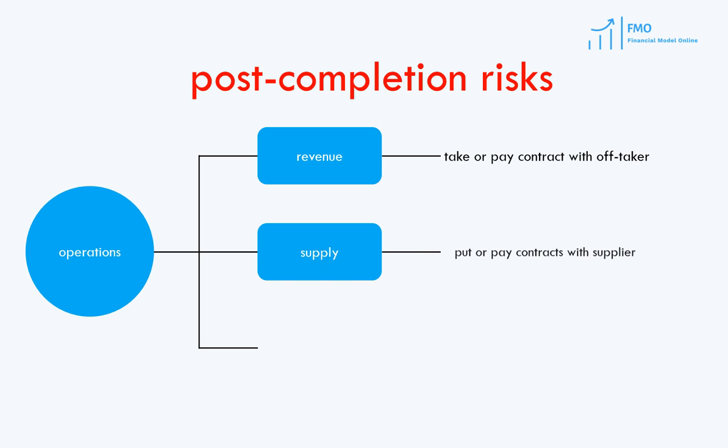Next is the risk of supply — that the necessary amount of raw material will be supplied to the project at the specified price in the supply contract. This risk is managed through put-or-pay contracts, under which a party agrees to supply a raw material for a certain price during a stated period and agrees to pay for an alternative supply if it cannot perform. So the suppliers take the risk.